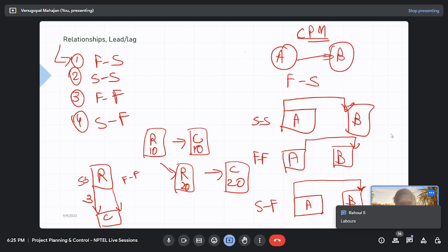Okay, this kind of example you will find in handover. Handover is one example of this, or decommissioning. Let's say on site you were initially working with a temporary electricity source, let's say a generator, and now you are shifting to electrical lines. So you can only finish your dismantling of the generators when the lines have started working, right?